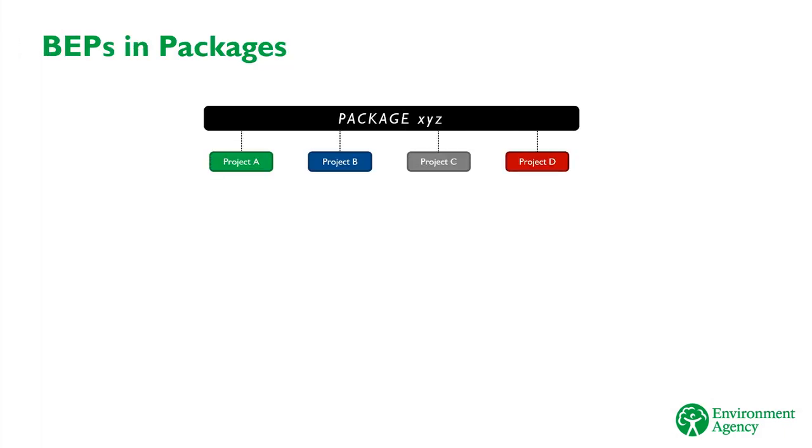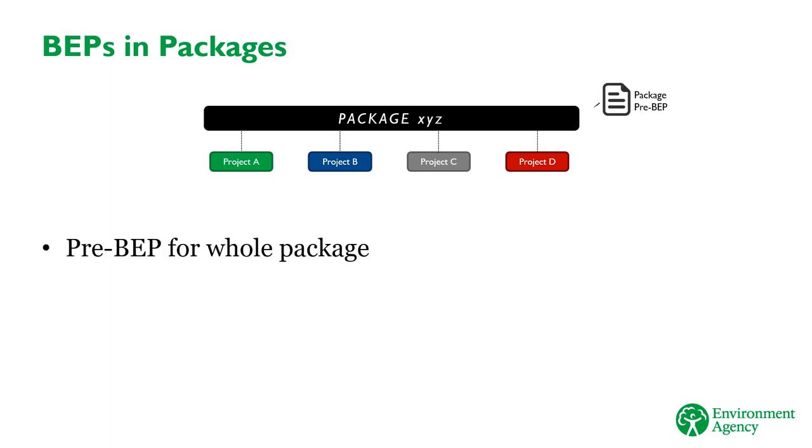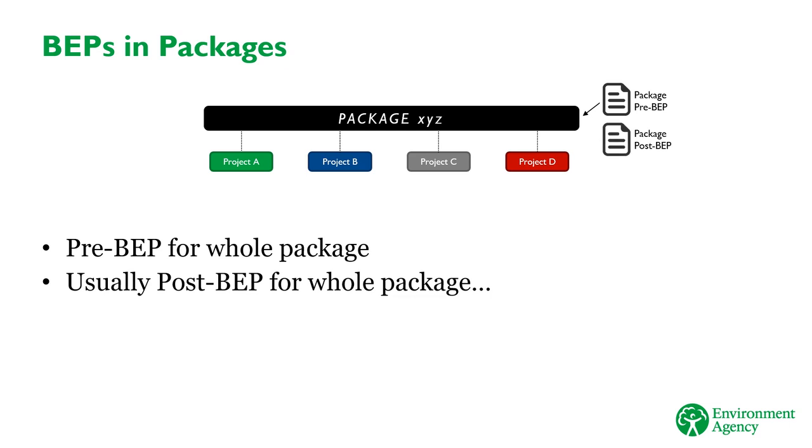When projects have been packaged, we can deal with BEPs slightly differently in order to work more efficiently. With a package, the pre-BEP can be produced to cover all the projects in a package. There's no need to produce one for each project. Post-BEPs can usually be dealt with in the same way, with one for the whole package.